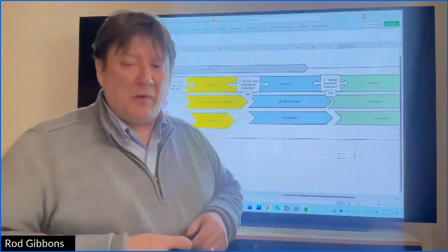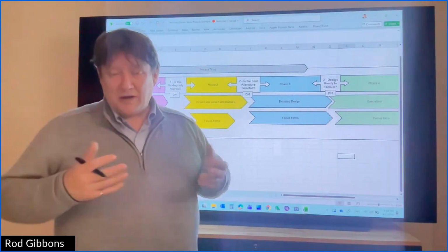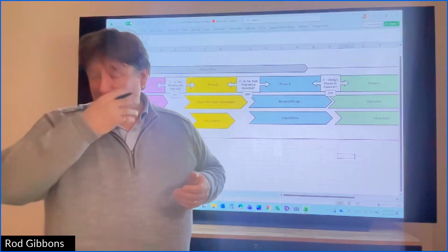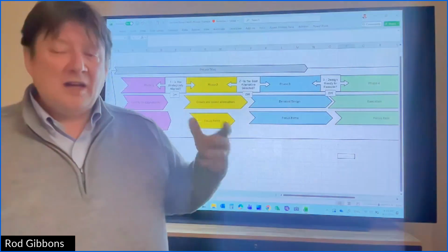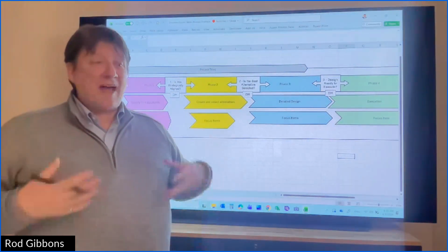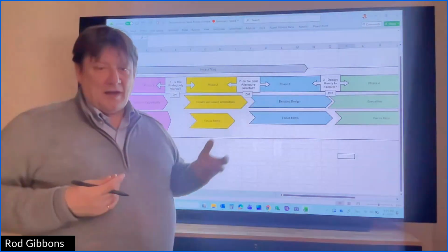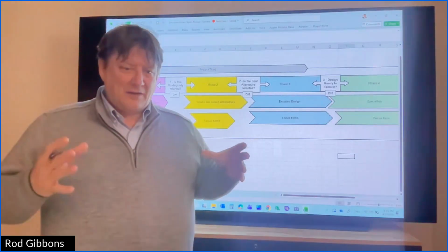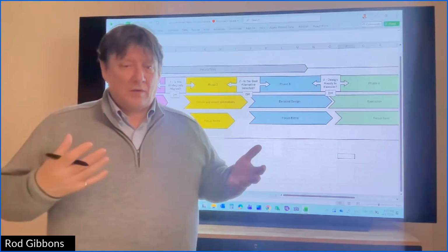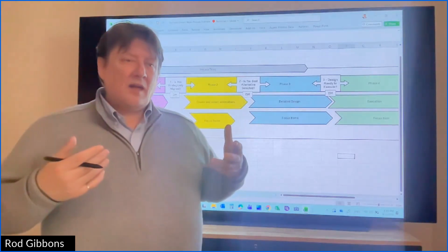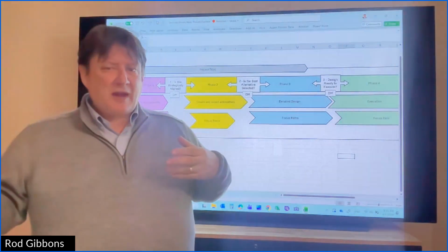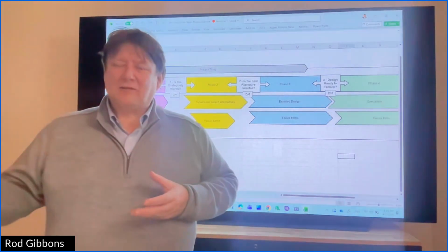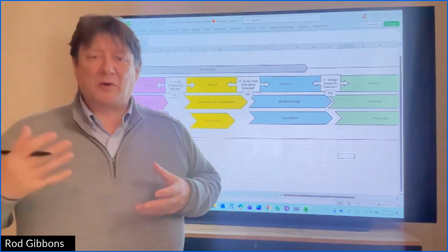How does it go in a team with multiple people? Again, on sizable projects, you can have a decision review board, and it can be 20, 30 people of different disciplines. They'll evaluate whether or not you're ready to go to the next phase. There is eventually a decision maker, but a review board can have a lot of influence. Especially when it's a very technical decision, the decision maker might have subject matter experts they're relying on to tell them their opinion on whether something is ready to move forward or not.